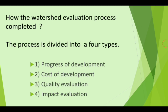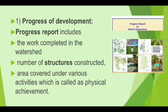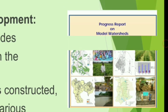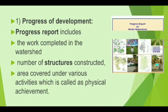Number one is progress of development. This is understood by means of a progress report. The progress report includes the work completed in the watershed. From that report, we understand how many structures are constructed and how much area is covered under various activities like check weir, check dam, CCT, or other treatments.